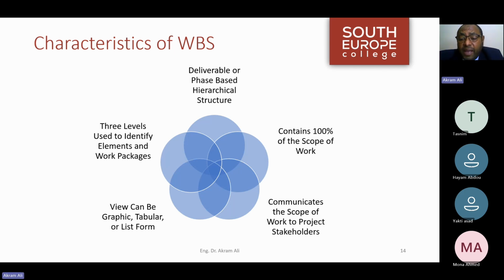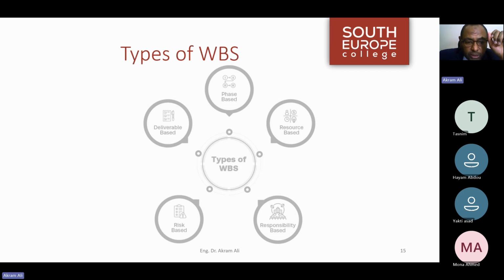But if I say I will pay against a milestone, delivery on site means delivery of all these items. So I will not pay for each item delivered on site. I will pay against a milestone, and such a milestone is the availability on site for all these items, and it becomes part of my contract with the contractor. And again, I will assign delay against milestones. So in order to perform good milestone management, I need to have good milestone project planning and scheduling.